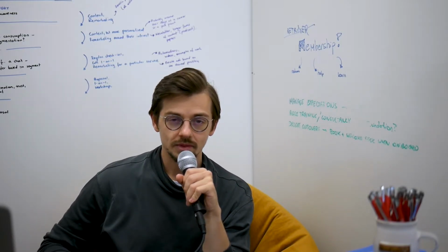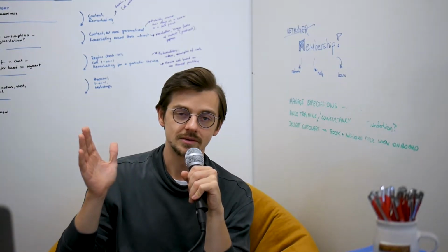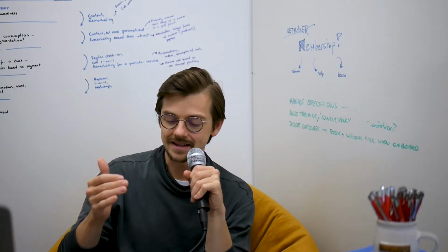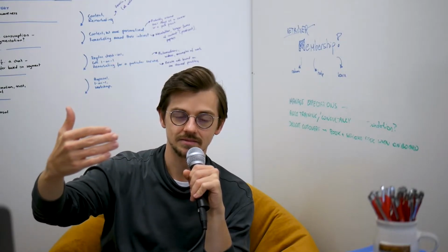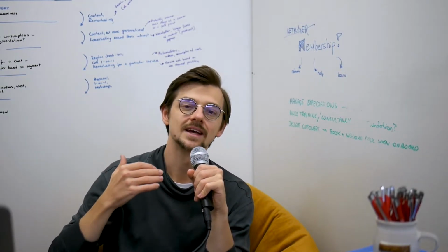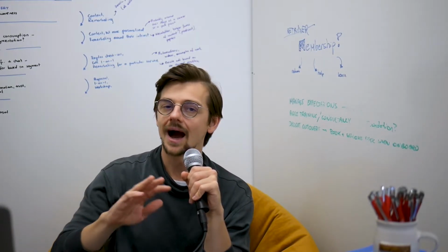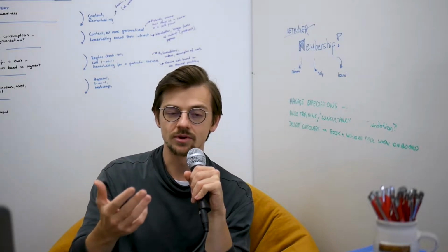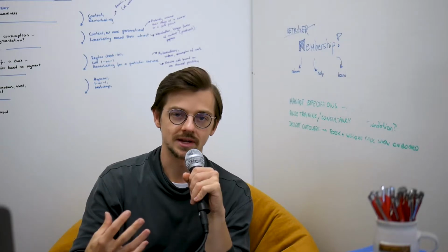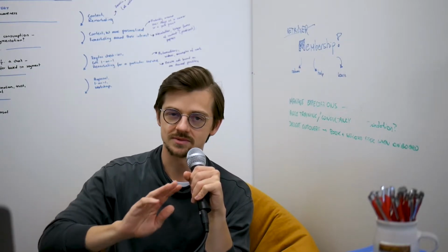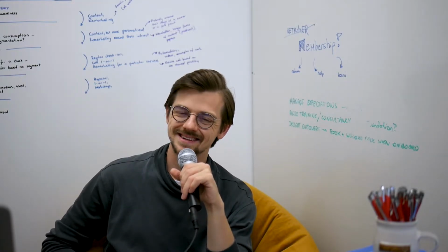But also what we do is we keep the client involved in every weekly meeting. And that almost shifts responsibility of prioritizing over to the client, or at least we get their input while we maintain the list ourselves. Either way, it's great because it removes that back and forth. In case we get it wrong, the client is there on the spot to correct us. And those two things just made the problem go away. And then comes design tags.